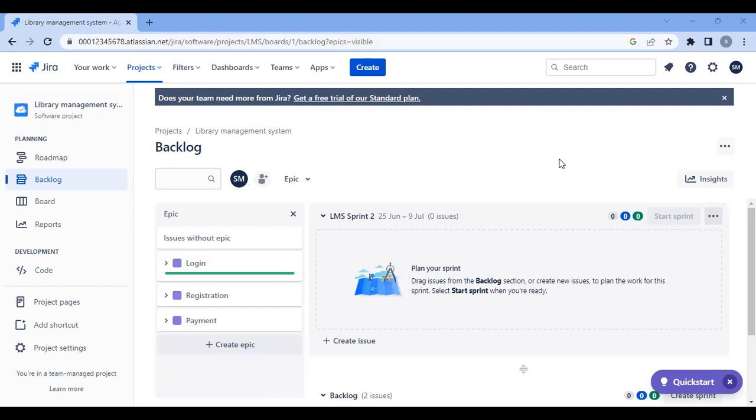Okay, and how does it get assigned to the BA? If it is a functional project user story, just like it is getting assigned to a developer, if a BA is required, it will be assigned to him. For example, let's assume for a user story I need to do gap analysis. That's a dependency. It will be assigned to a BA. He has to work on it, he will attach it there, and then he can assign it to the developer. Okay, got it. That user story has certain BA tasks. It will be assigned to a BA. He will do it and he will reassign it to the developer. Like that, it will happen.